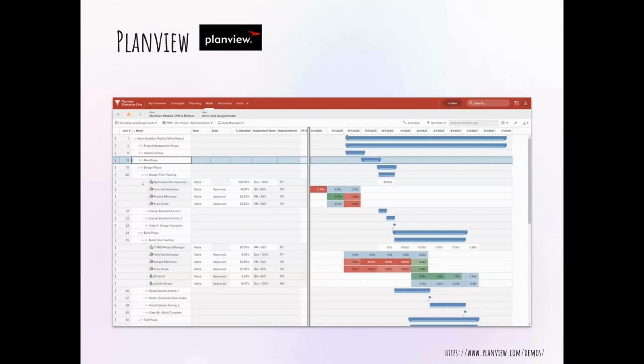But it is very powerful in showing that resource allocation. So someone has been allocated to the project, and then they've been approved by their resource manager for this many hours, and then you go through and you apply that many hours to each task, and based off of what date they're being applied to, in real time, that resource manager can see and approve or decline or adjust or have conversations. So this tool is great for doing things like that.